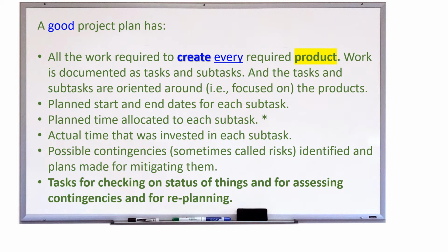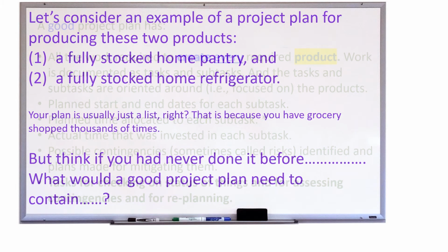And then this last item is really, really important too, because you have to include tasks and subtasks for doing the job of project management. Whatever you're doing for updating your project plan and checking on things and replanning, all of that kind of activity, that's work, that's part of this project as well and needs to be included in your plan.